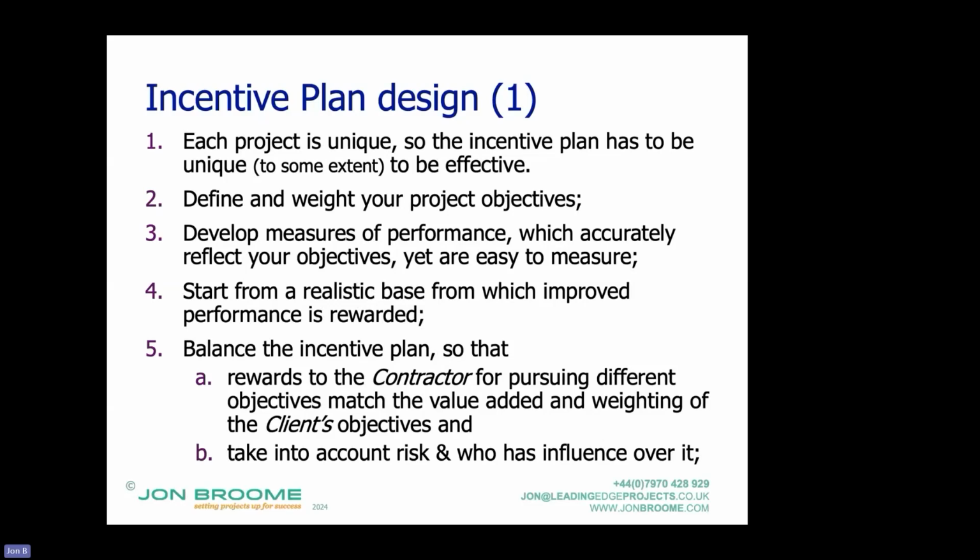Start from, and that's part of the easy to measure bit, start from a realistic base. When I did my research into incentive mechanisms, every bit of literature pretty much said the starting point needs to be realistic. And let's do it in extremis. If the starting point is too easy, it's a certainty, then the contractor's going to be making easy money. Basically, they're going to be getting a bonus for not doing much.